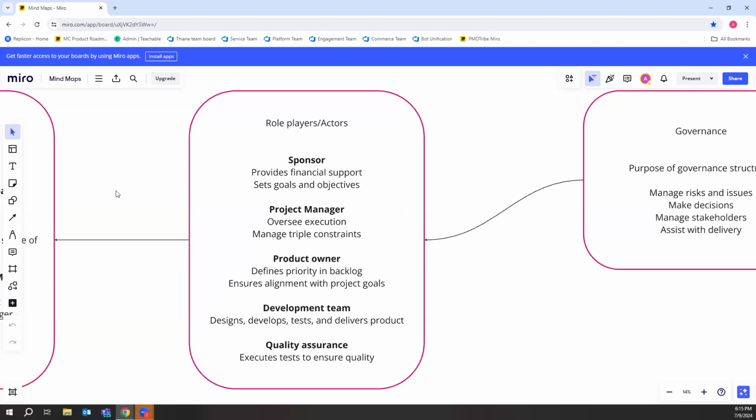So they'll appoint a committee, but you as a project manager always make sure that when you do your RACI, you have very clearly stipulated that within the project and the project team, we are able to make financial decisions up to a certain level, that we put that guardrail in place, and everything that exceeds whatever the amount is needs to be escalated to the project sponsor. All right. The idea around that is you don't want to bombard them with every decision. You want to be empowered and empower your team to make certain decisions, but you don't want to carry too much financial responsibility. I think within guardrails, you then escalate and elevate those decisions for them to make.